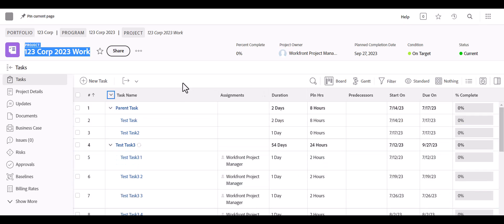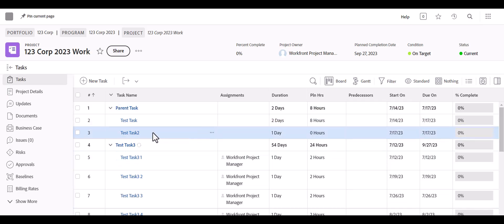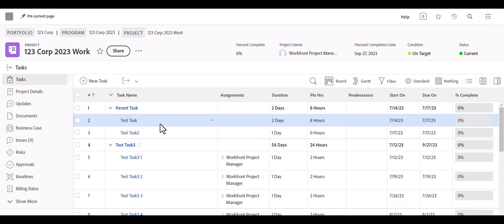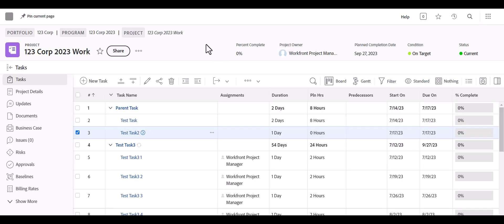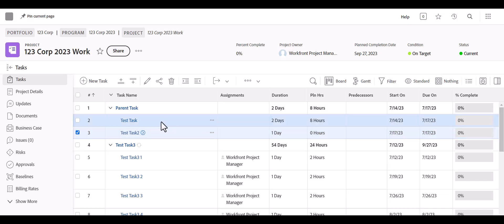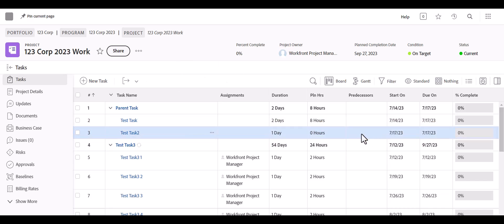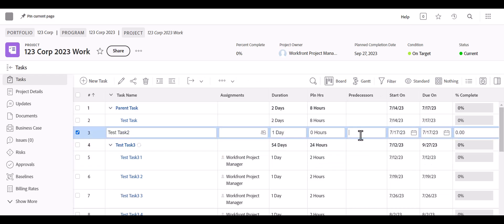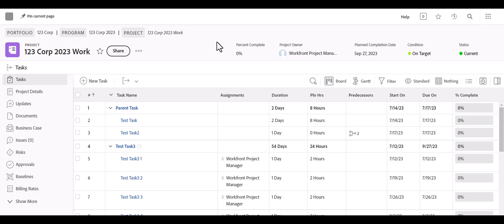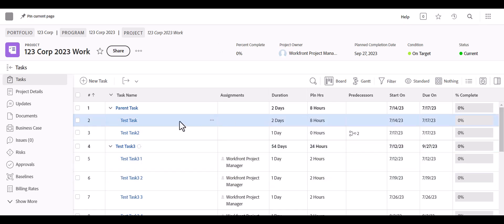The other feature is the option to use predecessors, meaning you can make a task dependent on the task before it. For example, you could say we can't start task number two until the first one is finished. If a task can't start until another is completed, just enter the number of the task it's dependent on in the Predecessors field — enter a two, for instance — and that task is now dependent on the other being completed.